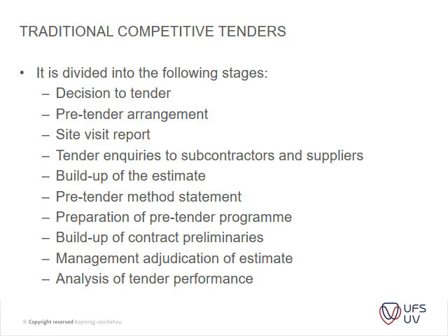So you're going to first take the decision to tender. You have your pre-tender arrangements, your site visits. Don't neglect your site visit. This is most of the times where you get your competitive edge on your other competitors that didn't visit the site.